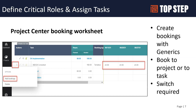There are a couple of ways to do it. It will allow weekly entry if you're entering into the grid — you can set a booking type and enter weekly amounts for that resource. There's also the ability to do an Add Booking. If you click Add Booking next to the resource, it opens up the booking form from the Project Center. You can book just like any other way — book to a project or task, select a resource, set a start and end date, and enter hours or percentage. Once you save, it will display that data on a weekly basis.